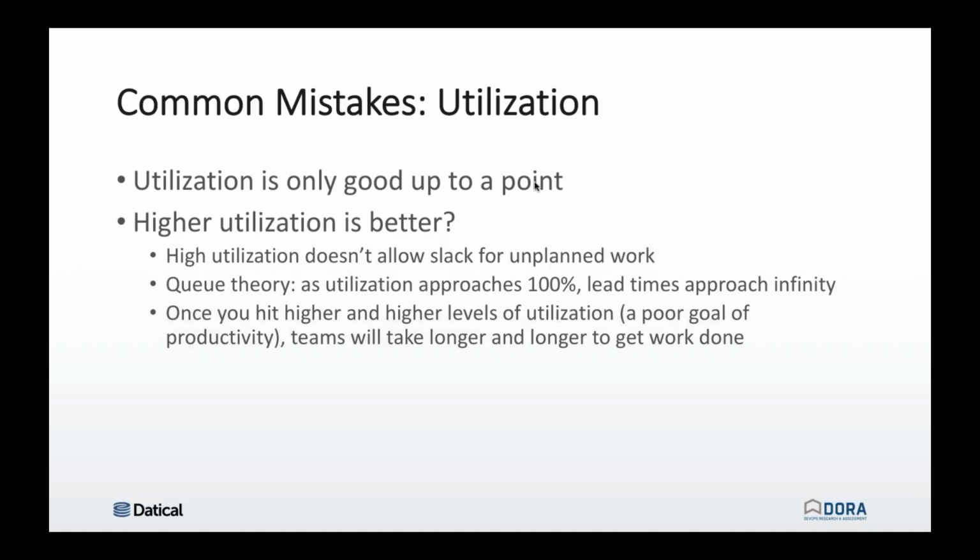Something always comes up. And you know what? We should expect this. When we think about doing the DevOps, we always talk about development work and building in fast feedback. What do you think fast feedback is? Fast feedback is the allowance for getting work back that broke, that didn't work. So we have to fix it. If it breaks, that means something unexpected happened and I needed to fix it. Well, queuing theory, math, tells me that as utilization approaches 100%, lead times approach infinity.